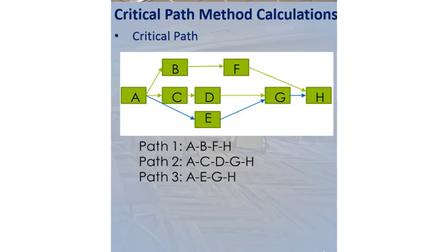Now, let's assume that one of these paths is critical, and when a task on this path is delayed, all the project will be delayed in the same amount. This path is called the critical path. Any delay on the critical path will delay the due date of the project at the same amount. Therefore, we need to be careful about each task on this critical line.